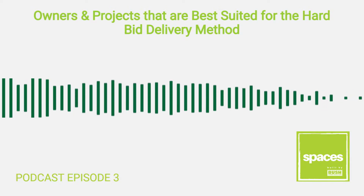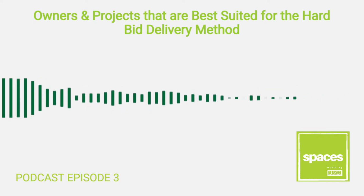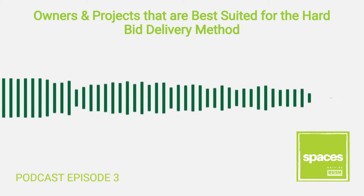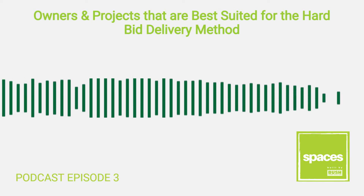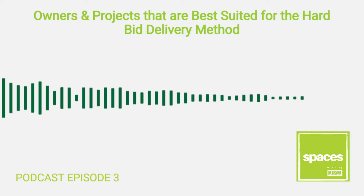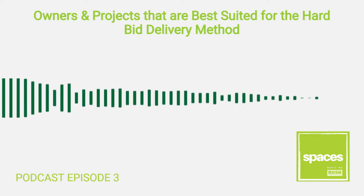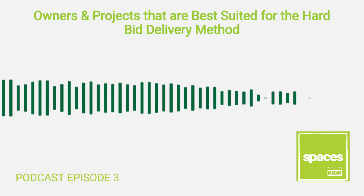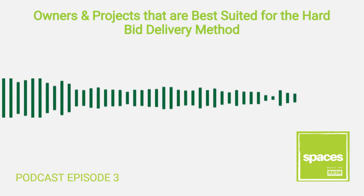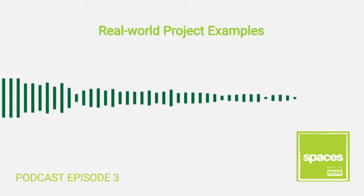One final thing to consider when to use this project delivery method is when you've got an advanced owner who understands this delivery method. So if there's an owner who's done this before, built buildings many times, not only who has done it, but who has done it successfully in the competitive bid delivery method, this one is a good option for them because they know what they're getting into. They know how to administer it. They know how to make sure it's less contentious than more contentious because of their past involvement and their past understanding of the way the delivery method works. Really, having an owner who's understood this and delivered this successfully before would be another time when to use this.